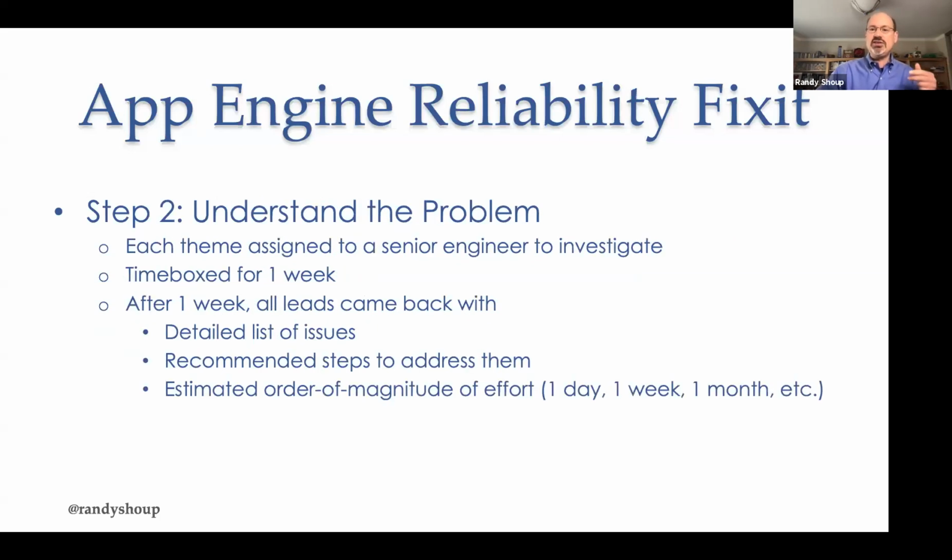Then for each of those themes, we assigned or voluntold one of the senior engineers to take that forward and investigate it more deeply. So, we had a bunch of brainstorming ideas as a group for a couple of hours, but let's have a particular engineer take it forward and she'll think about more detail. We time boxed that for a week. And then after a week, basically everybody got back together and we reviewed what all the individual engineers had said about their individual themes.